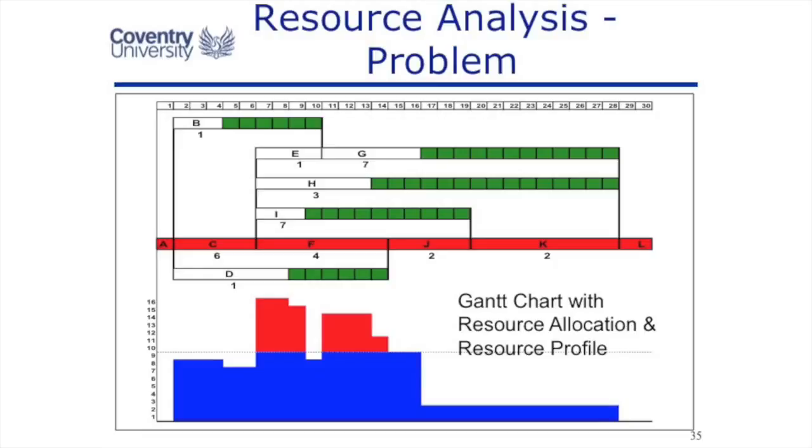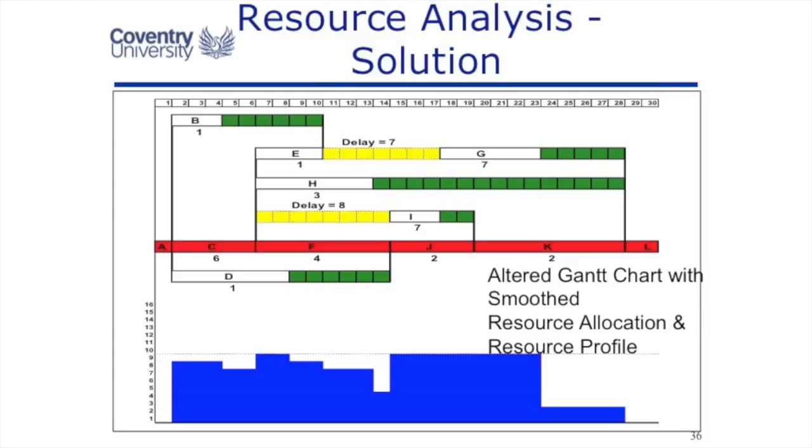Cancelling another project is the wrong answer. That might provide resources for these peak periods, but it will demotivate that project team. Why was their project cancelled? It will demotivate my project team. Aren't we good enough to complete this ourselves? It's not required because the correct answer to this problem is to use the float.